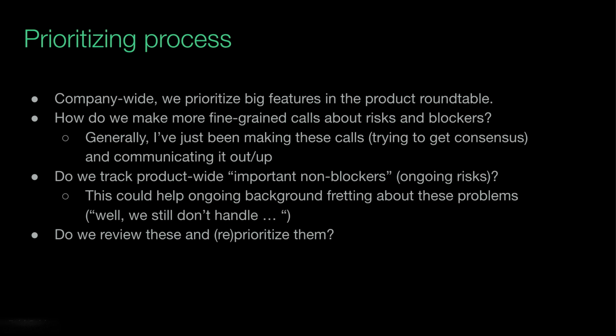Something that I think has been really useful for us, for me, is creating this bucket of important non-blockers that we can put things in and know we're not going to lose track of that thing. We know that this is an ongoing risk. We're going to review that regularly. That's been really helpful for me. But I don't have that for the rest of the product.